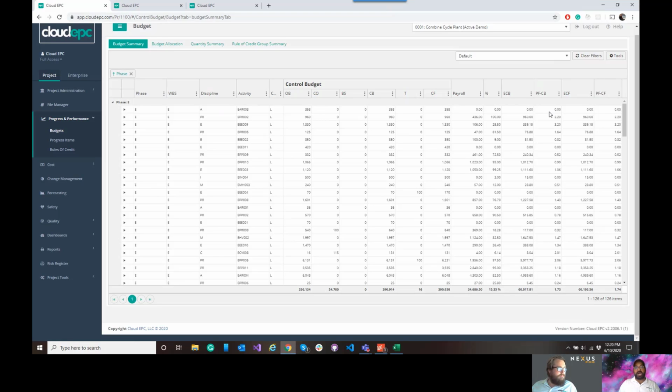You can also opt to just not use the trend and the current forecast and just run the approved budgets and run everything against your current budget. It's how you choose to apply the system. But that idea of a detailed level advanced work packaging tracker and then rolling that back up to our budget tables, also being able to layer in our timesheets into the system, we can now look at our actual labor spent, our earned value, and our performance in one module.